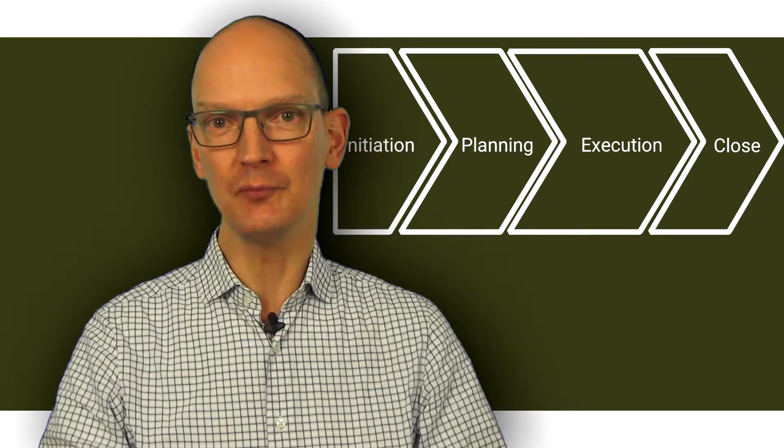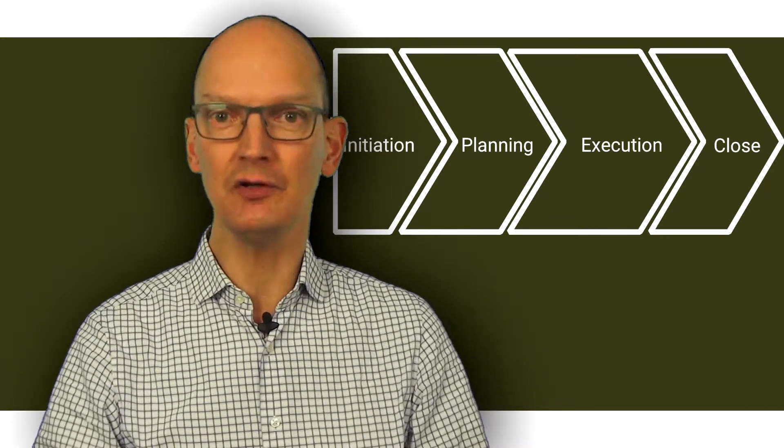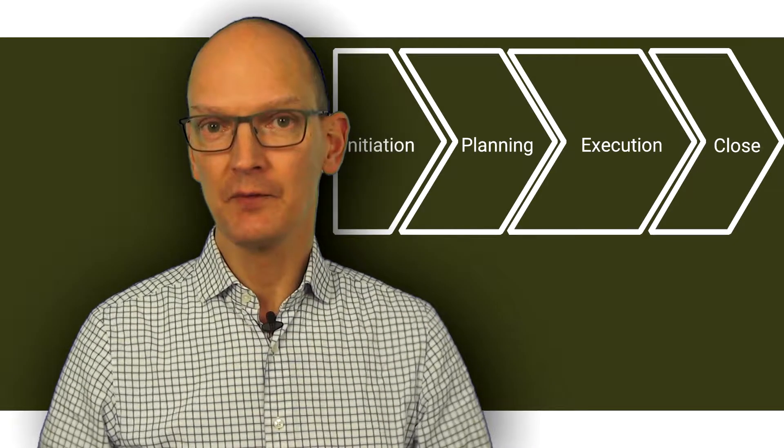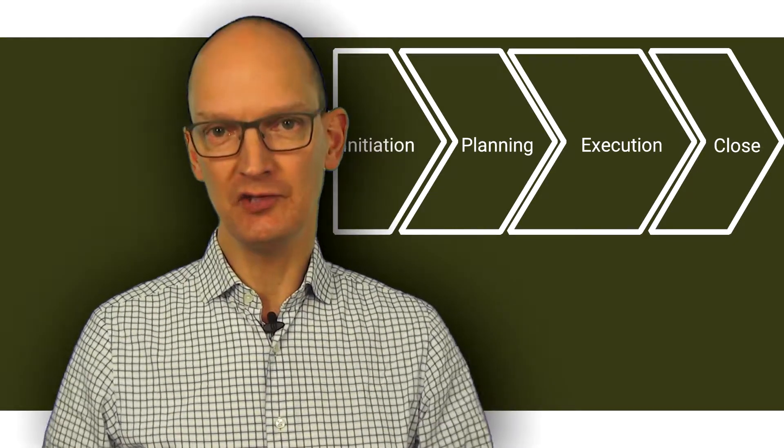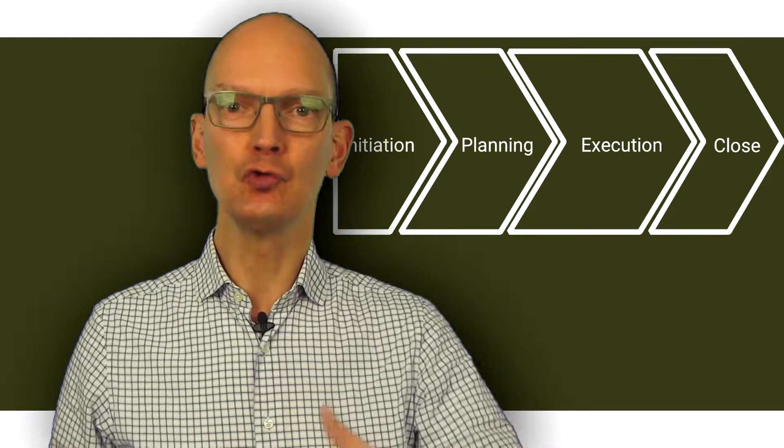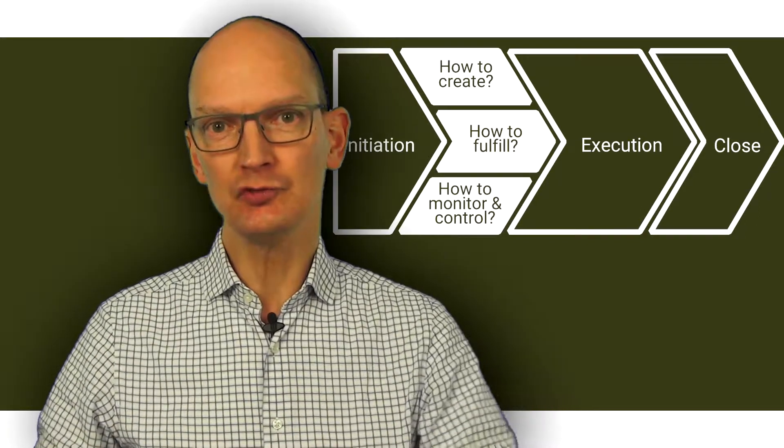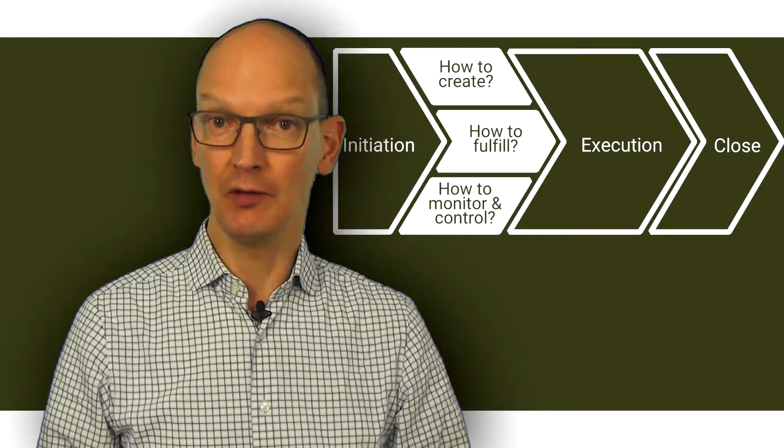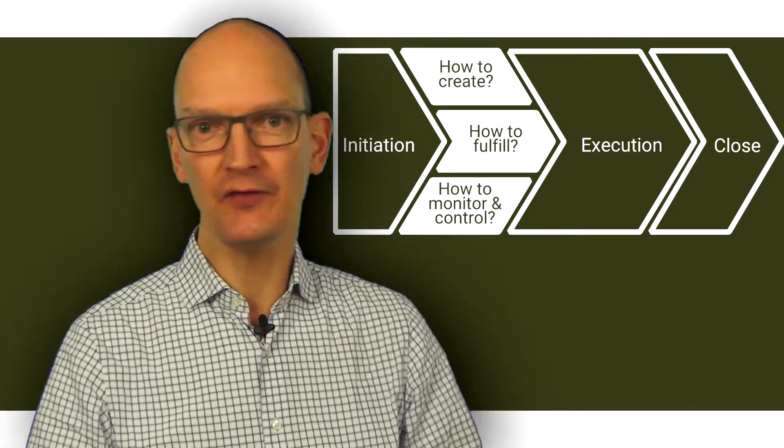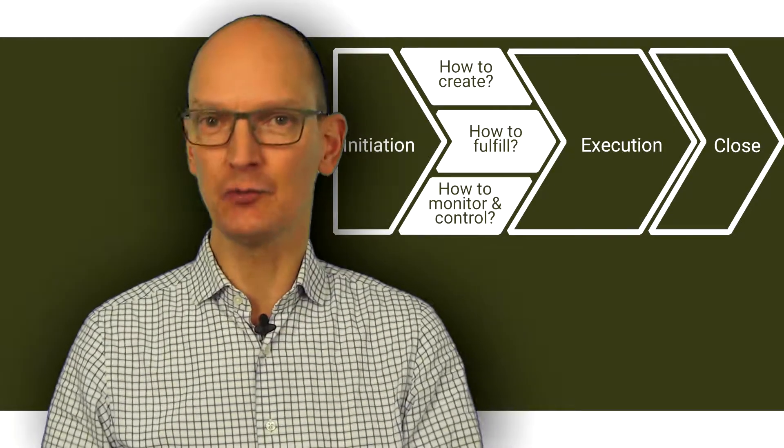Once you have collected all this information about what the project must deliver and what the boundaries are, then start planning. And you have to create three distinct plans. The first plan is how to create the product. And this is what your team will be working on during the execution phase. Or keep it simple. You really don't need to tell them how they should do their job. That is what they know.